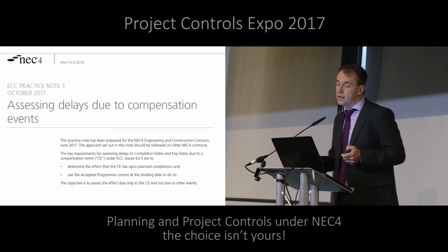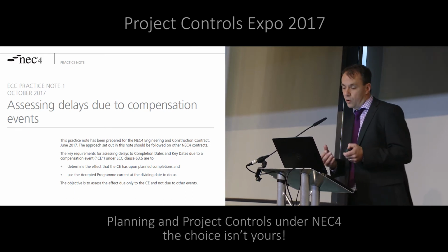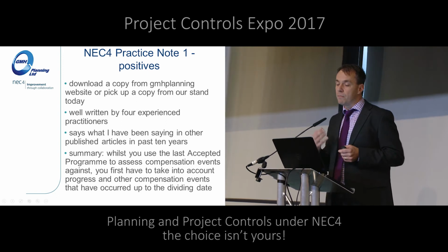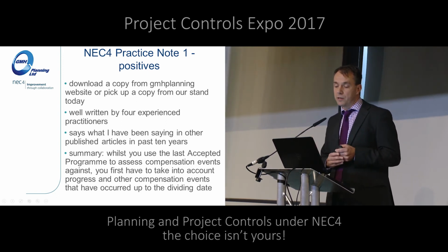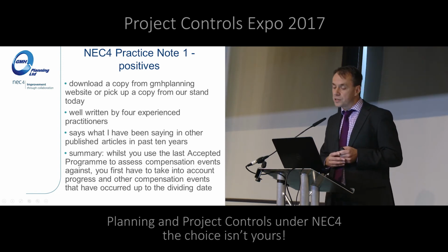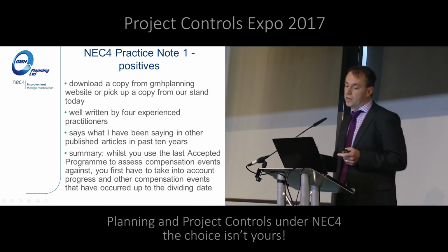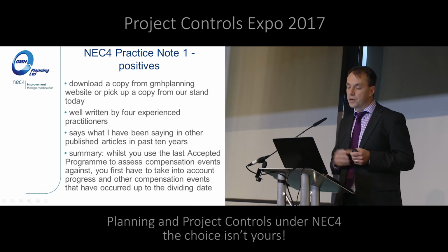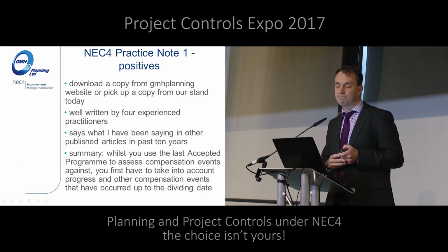So basically, it is a summary of what that clause is actually saying. The good things about the practice note: well, it's well written by 4 experienced practitioners. It says what I've been saying in articles for years, and in summary, it says that when you use the last accepted programme to assess CEs, you first have to take into account progress and other compensation events that have occurred up until this dividing date.